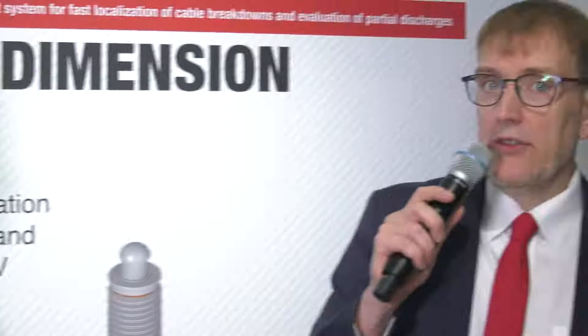Yeah, to report out of the cable session from yesterday, there is a cable project between Belgium and Germany where they exactly have done the testing in that way. 70 kilometers of DC cable that was tested with AC first to check the integrity of all the cable accessories, and in the second step to do then the HVDC test for the final commissioning.